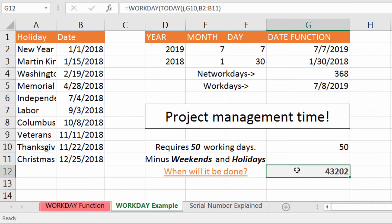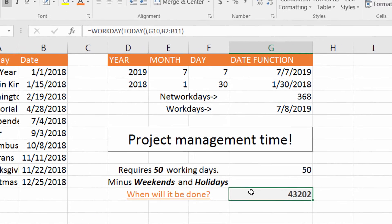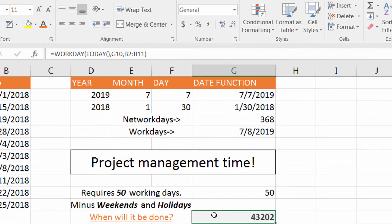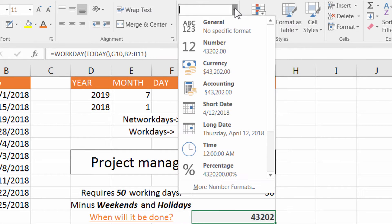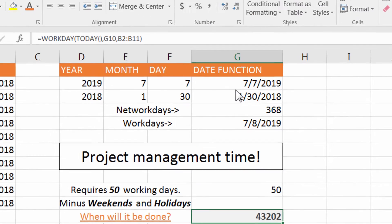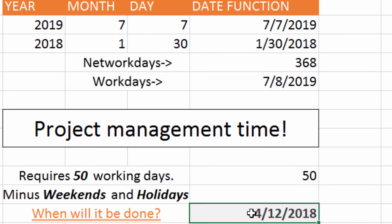And it returns 43,202 — not quite a date. You'll have to format that, so go to Number Formats and select Short Date, and I can see that the end date for this project should be 4-12-2018.